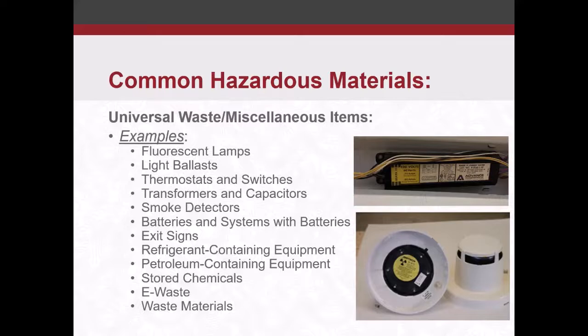New York State has regulations on how you manage waste. If you're not a transfer station or landfill facility, you can't have waste just sitting around on your site. You've got to get it to one of those permitted facilities. So if you have a renovation project and a bunch of waste sitting outside, it's a good idea to get that taken care of and out of there so you're in compliance with New York State requirements.